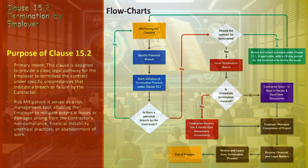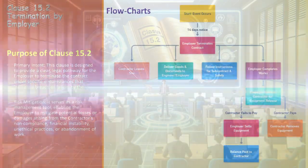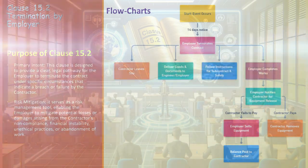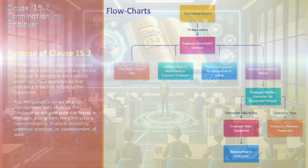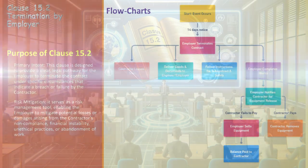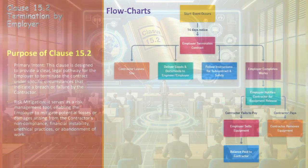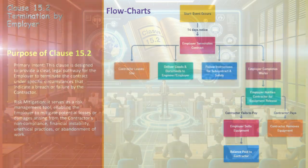After contract termination, the employer may proceed to complete the works either independently or through other entities, with the duration depending on the remaining scope and arrangements made. The contractor's equipment and temporary works are released, usually conducted shortly after termination, though subject to settlement of any outstanding payments. The process concludes once all actions following the decision are fully executed. The total duration varies depending on the complexity of the breach, response times, and subsequent actions. This flowchart offers a clear roadmap for managing contract termination scenarios under Clause 15.2 of the FIDIC Yellow Book.